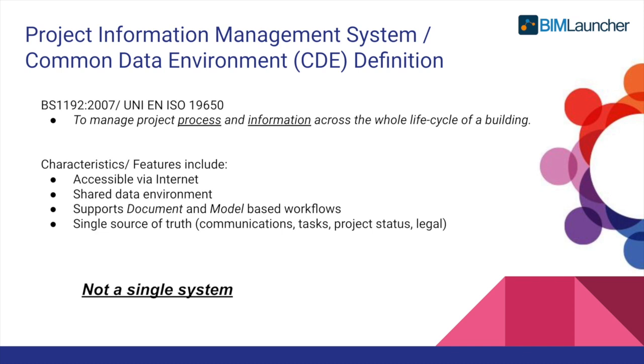And essentially I suppose a common data environment, according to BS 1192 and the ISO 19650, its core purpose is to manage project process and information across the whole life cycle of the building. And that was kind of reduced from a couple of lines to that. So the characteristics and features include that it's accessible to the project team via the internet. It's a shared data environment, so there's multiple systems, multiple users, multiple projects on these systems.